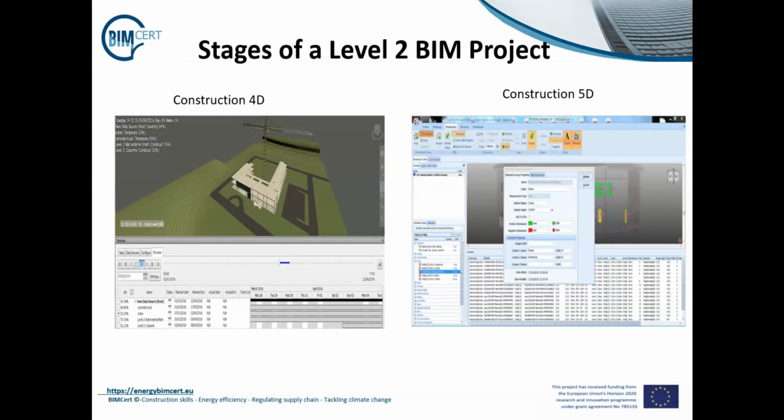When estimating project costs, estimators primarily do manual takeoffs, and this can result in human errors and potentially lead to inaccuracies in estimates. Technologies such as BIM have the potential to impact cost estimating in a significant way, as it enables automatic quantification and the production of schedules, which will largely eliminate the need for manual takeoff.